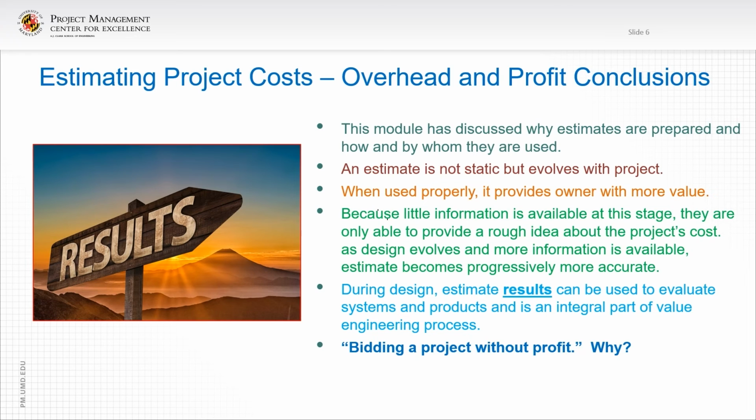Turns out we were very efficient on productivity on the project and did well on markups on change orders and actually got a profit at the end of the day, at the end of the job. So be very careful. That profit markup is really a reflection of a business decision that needs to be included and reflected when bidding a project. And finally, weather. Let's say a few words about weather.